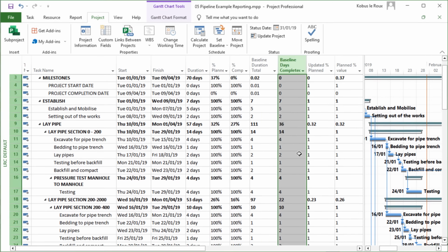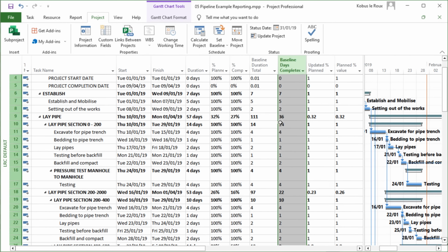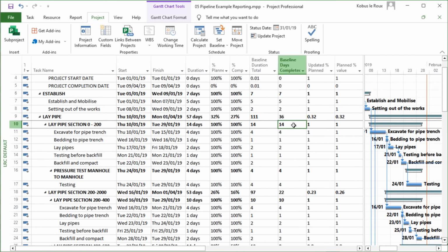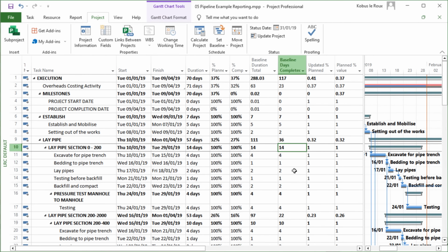We're looking at the total weight of tasks below a heading. It all tallies up to that heading. And then we do the calculation of percentage complete based on those volumes. So here you can see the updated percentage planned, which is now a better version of the planned percentage than the previous one, is 41%.